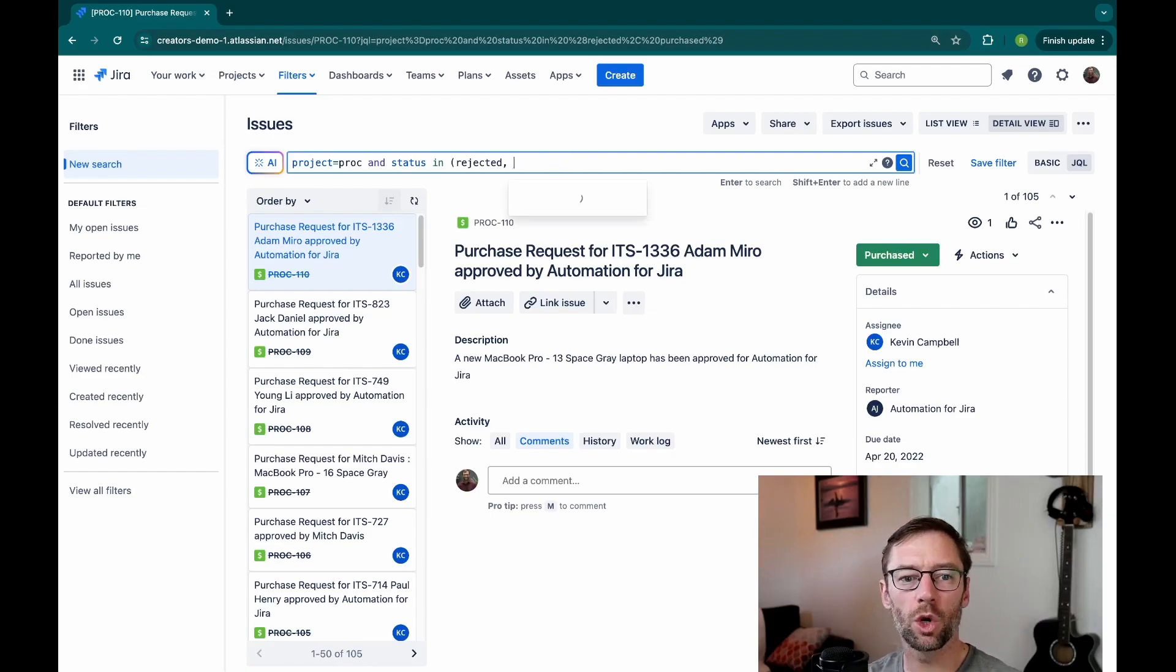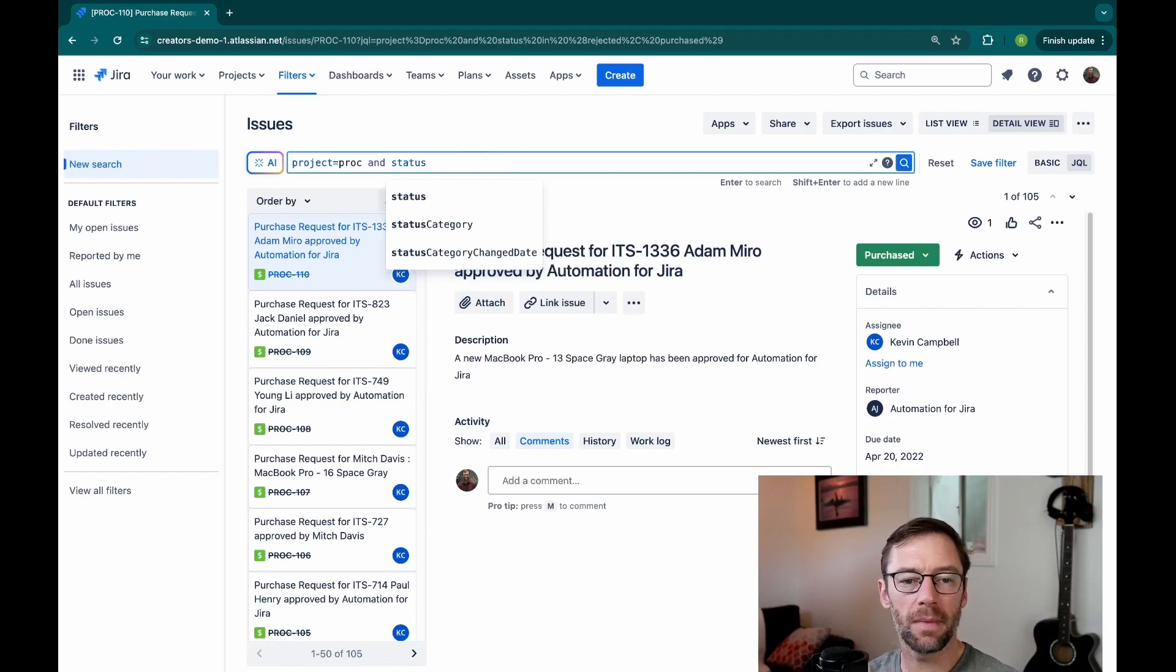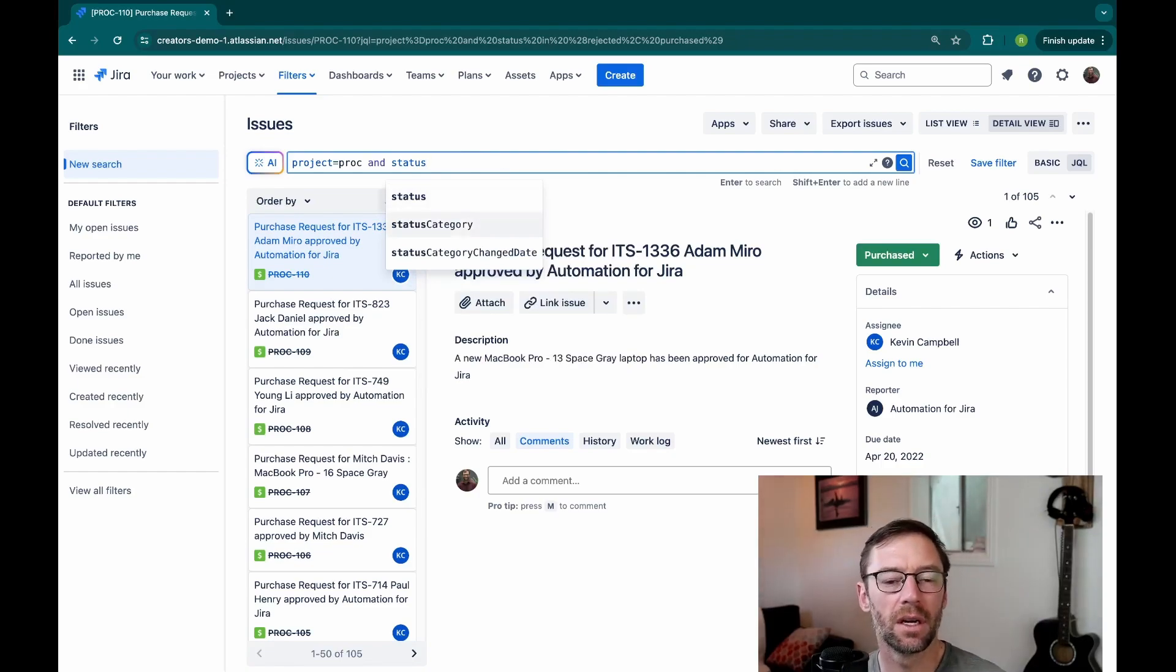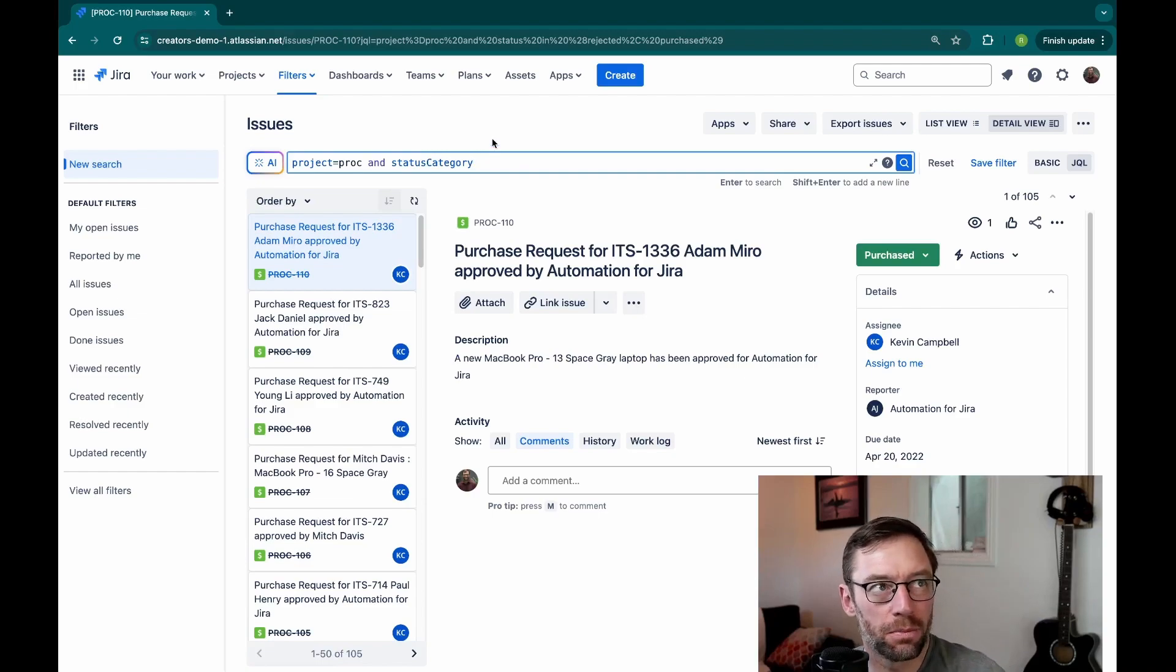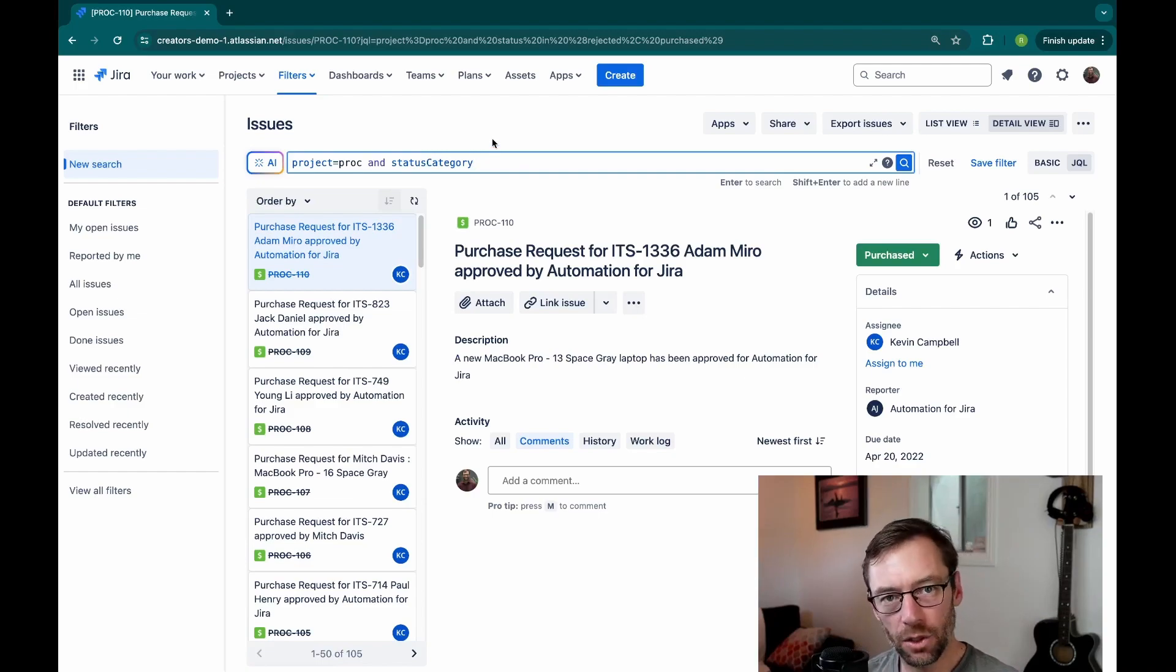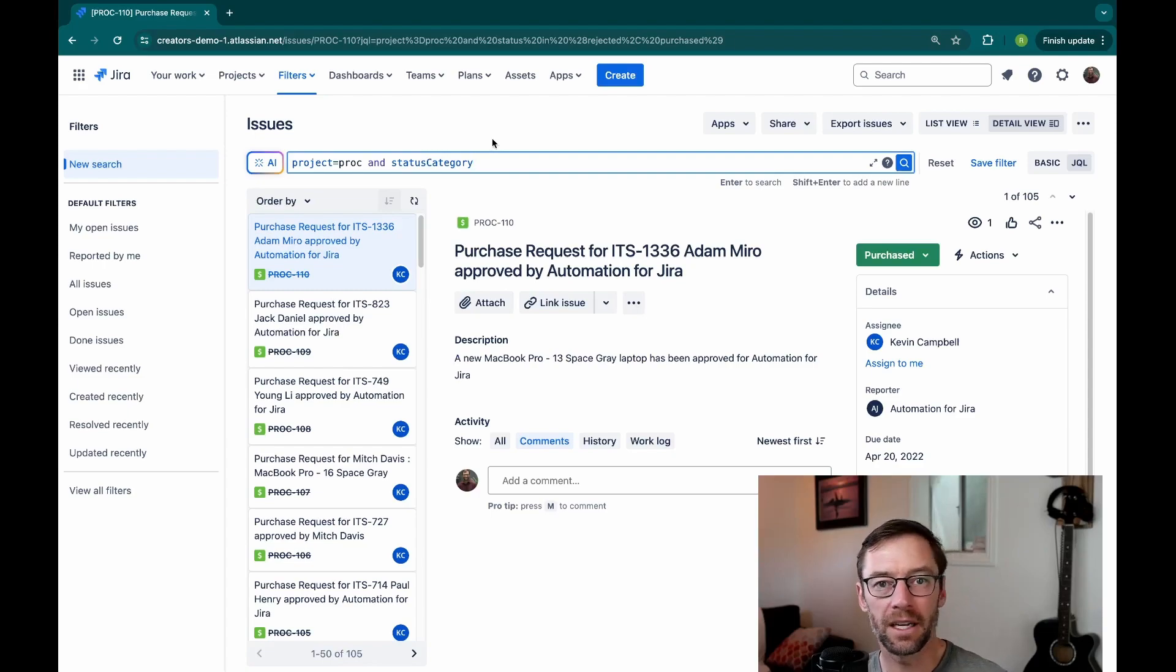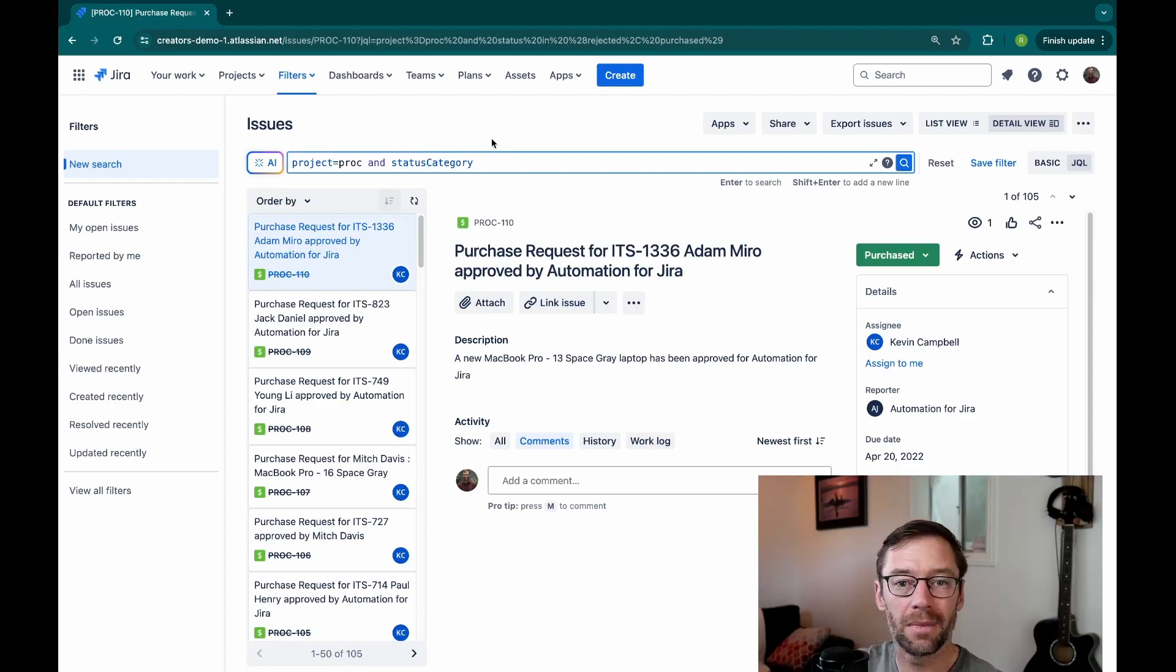So instead of using the status field, I'm going to use something called status category. And we'll see my autocomplete brings it into the second option here. Instead of looking for just a particular status, purchased or rejected, it looks for any ticket in a group of statuses. My to-do statuses are the gray ones, in-progress are blue, and my green ones are done.